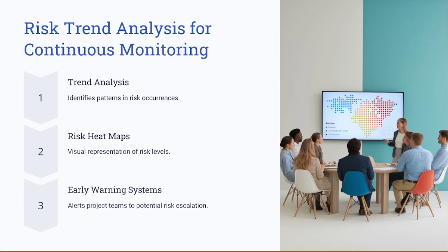We assign values from 1 to 5 on the occurrence. So by the probability and the impact, you create this risk heat map, a visual representation of the risk levels, and it shows how they change over time. So this is all about the risk heat map.